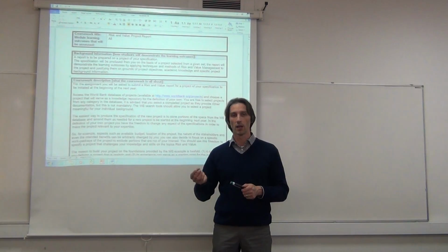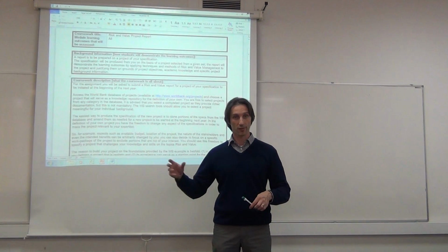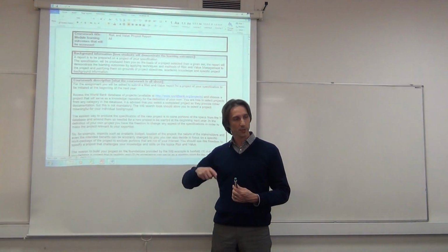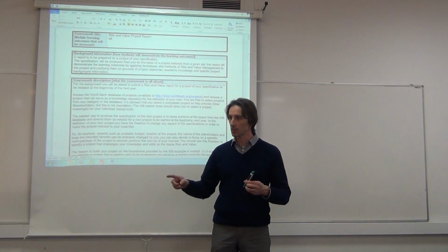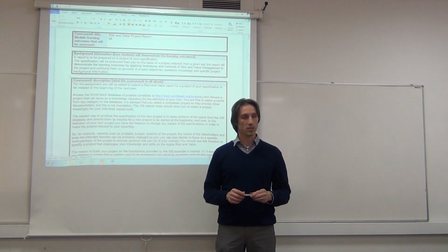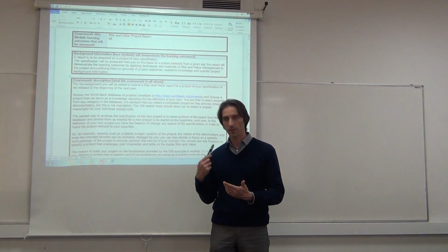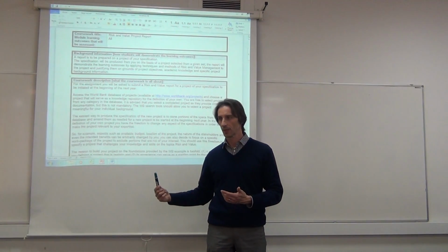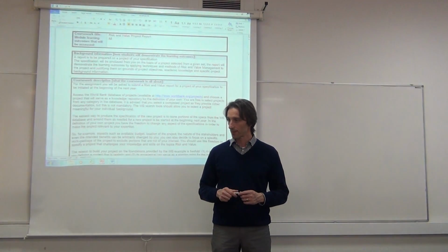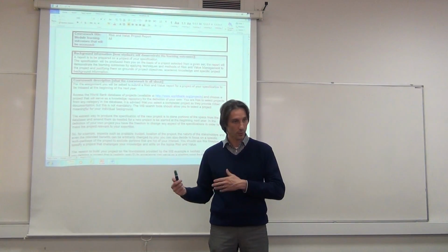Not only from a risk owner, somebody that has the responsibility to make sure that that risk doesn't occur, but also maybe a more complex flow of activities that prevent that risk in other ways. Or also, possibly, that react to a risk event very swiftly so that the consequences are minimized. Not at the level of the specific risk, but maybe for all of the risks. So the governance profile that you select will have to be adequate to the risk.